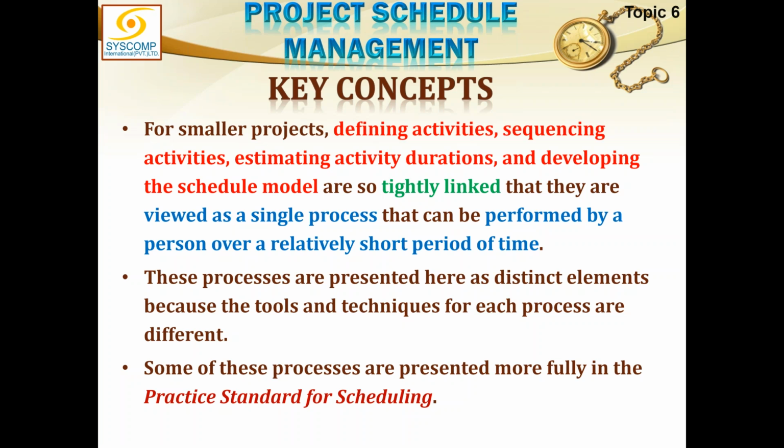So before putting in any constraint, be free of mind and consider in a normal situation how this work should be done. If there is no constraint, how could this work be done? What is the most viable timing in which we can do this project? And then, even without considering any constraints, come up with a best case scenario and a worst case scenario. Do not consider the constraint as yet. Just consider what good can happen to you, what is the maximum time that can be given to you.